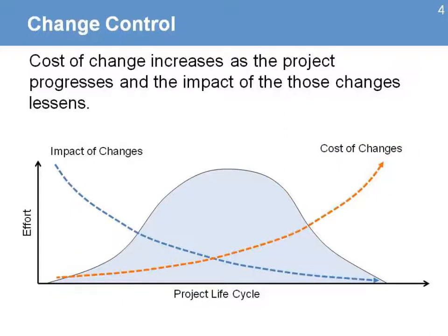Ideally, most of the changes will happen around this period of time when the costs are not that significant and you have a good impact. They don't happen here because for those changes, you don't have much information about the conditions in the project or changes in the context. You're going to start getting more information when you are maybe two-thirds into the project, and then you have a better sense. That's when you start seeing opportunities for changes or reacting to changes based on the issues or problems that the project begins to face. So that will be the good time when changes should happen in your project.